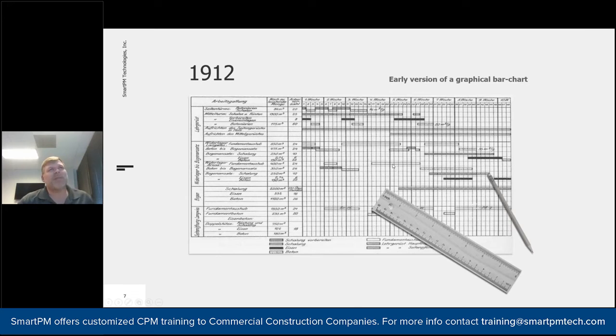It's essentially taking a process that we do in our brains. When you're thinking about it as a super or as a PM or anybody in construction, when you're looking at those designs, you're thinking about order. You're thinking that I'm not going to be able to put in a foundation until I dig a hole. And once that foundation is in, then I can start laying out each floor. And once those floors start going up, I can start working within those floors. And you really do have it mapped out in your brain of dependencies, but this program is designed to bring that to light for everybody and also give you a little bit more than that. But we'll get into that in a sec.